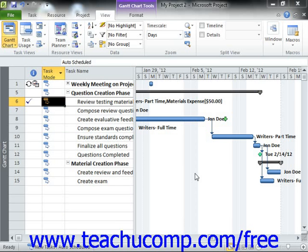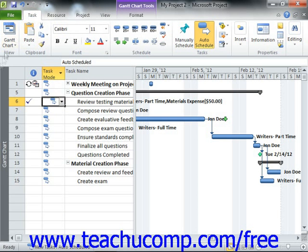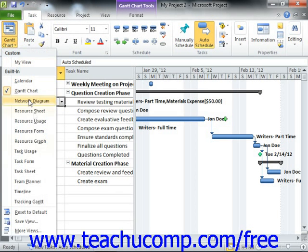In order to view the critical path in your project file, you can switch the view to the Tracking Gantt view. To apply this view, click the Gantt chart dropdown button in the View button group on the Task tab within the ribbon, then select the Tracking Gantt choice from the dropdown menu that appears.